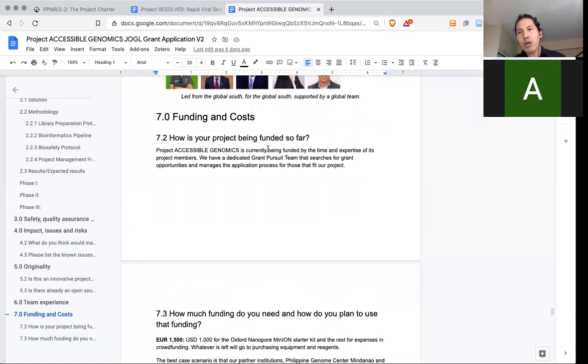So the charter is actually your agreement. And this is like, okay, this is what we're gonna do. So if there are changes, this also protects you as a project manager, because one of the most common problems in project management is scope creep. So if your stakeholders are asking for something beyond the project, you would want them to go through a change management process that assures that, for instance, you have the additional budget and the additional people you need to do that new project. It's a different kind of project if you add more scope there.